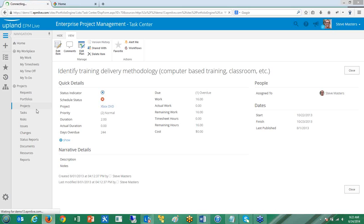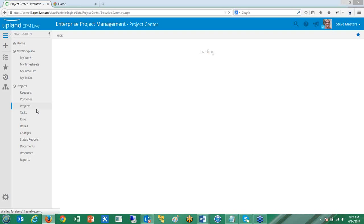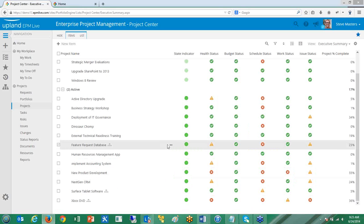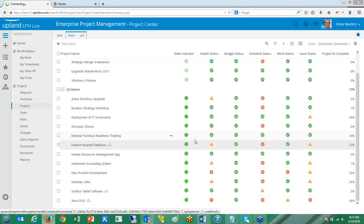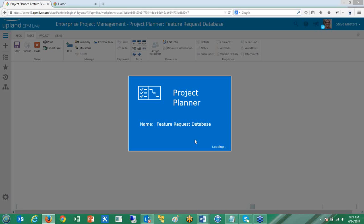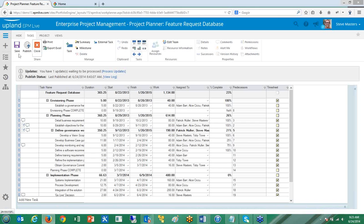The next feature is one that people have been asking for for a while — our fragments feature — which has to do with project planning. The use case is: I'm building my project schedule. I can start from a template, which we've had for a while. But the new feature allows me, once I've already started planning, to insert fragments of other schedules so I don't have to rebuild them every time. I can save small pieces of a schedule — maybe one milestone with some subtasks under it — and build up a nice library of different fragments that I might use from time to time.